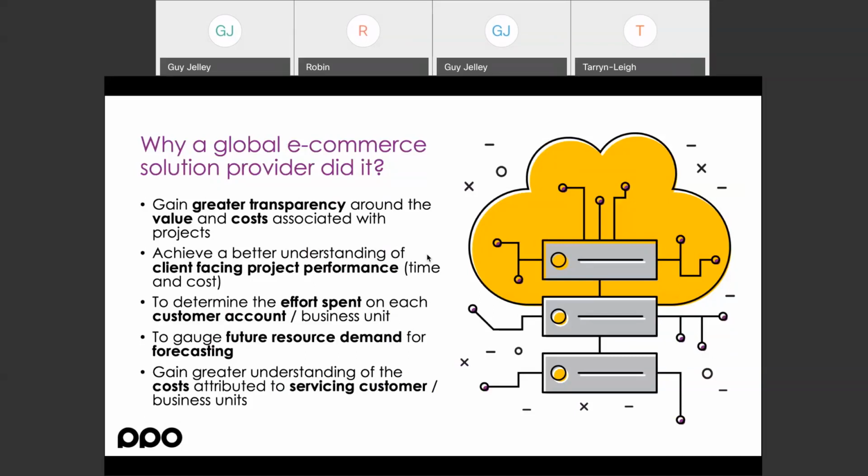And if they could get to a better resource planning and then ultimately utilization, and the plan time and the actual time, they could craft a more predictable forecasting model going forward based on their sales pipeline of what the resource demand actually was. And that was key to them, and that's really where the value sat. The end result over here was actually pushing back into the sales pipeline and sales channel around what the teams were actually selling from a duration and effort point of view.